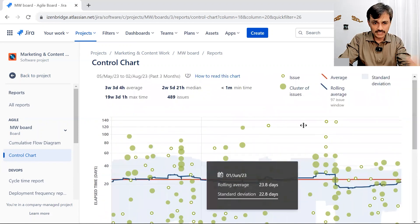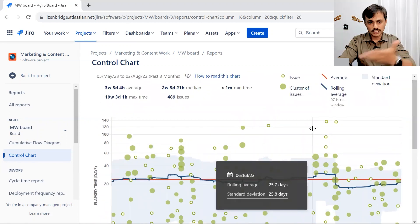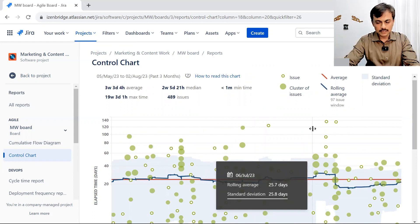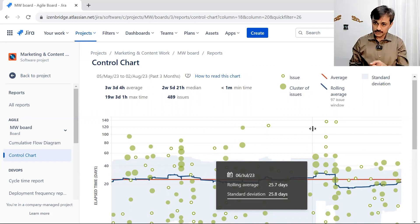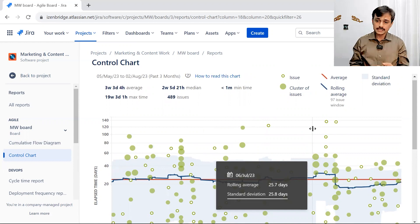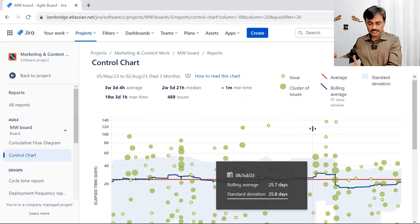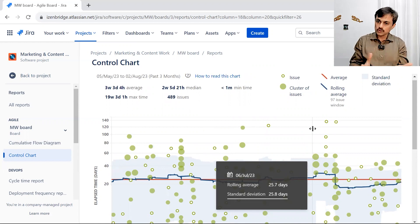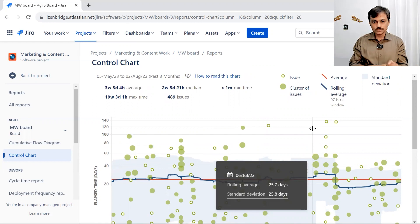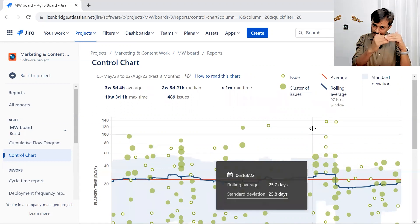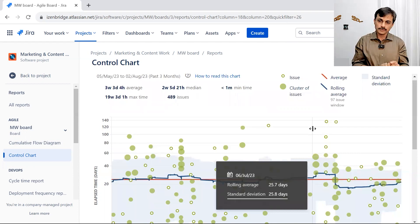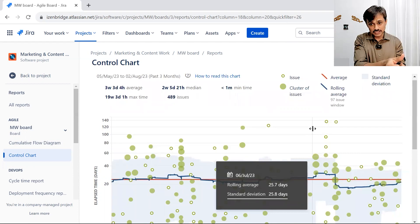You also have the option of including or excluding non-working days. I usually keep non-working days excluded, so they are not counted in the calculation. The key for using this chart is: first, data segmentation — identify and exclude outliers that may confuse the whole chart. Then I watch how the trend is going. On a monthly or bi-weekly basis, we aspire to bring our rolling average gradually down, and we do an analysis of outlier items.